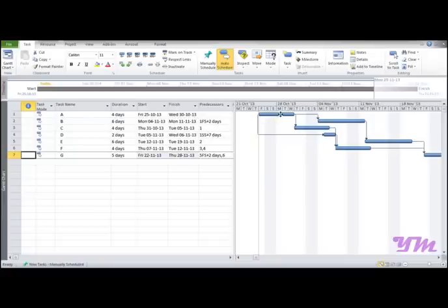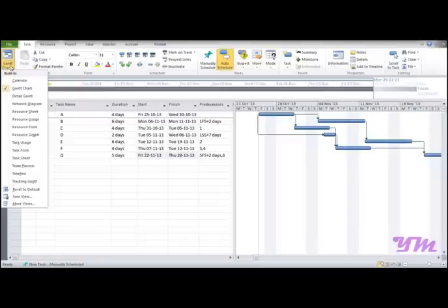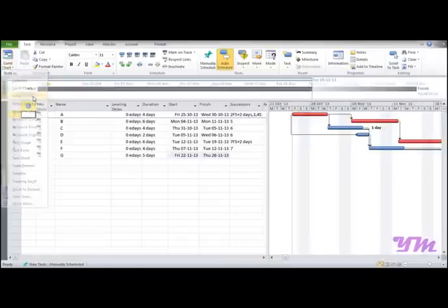You can see over here that all the activities are in blue color. So you cannot actually make out which activities have a slack, or in other words what we call a float. The detailed Gantt chart gives a much better and proper understanding of which are the critical activities of the project by highlighting them in red color. So if we again go back to the detailed Gantt chart view, click over here, detailed Gantt chart view. We can see that all the critical activities, that is activities A, B, E, which are critical in the project, are highlighted in red color.